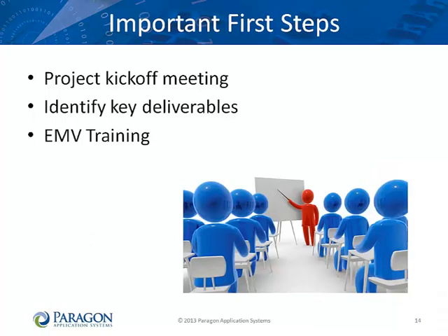Hold a project kickoff meeting with everyone involved in the project. Get everyone on the same playing field. Help them understand the goals of the project and every group's role in the project. Set expectations. Explain the deliverables and the timelines. Explain how time accounting, change management, status meetings, and similar items are to be handled. Next, each group must determine what they need to do in order to make the project succeed.